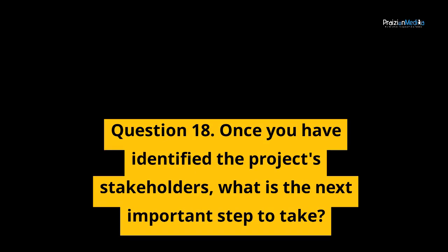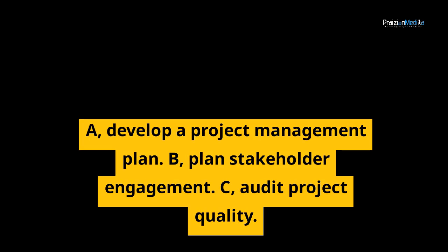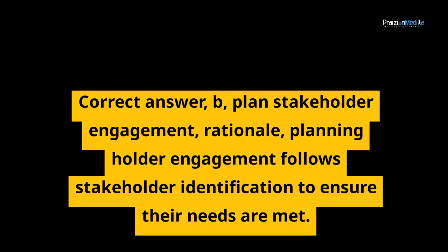Question 18. Once you have identified the project's stakeholders, what is the next important step to take? A. Develop a project management plan. B. Plan stakeholder engagement. C. Audit project quality. Correct answer B. Plan stakeholder engagement. Rationale. Planning stakeholder engagement follows stakeholder identification to ensure their needs are met.